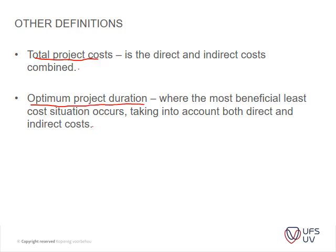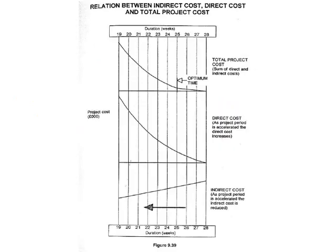We're going to look at total cost and project duration by means of an example. Basically, you've got your indirect costs and your direct costs, and if you add those together you get your total cost. Your indirect costs have a constant slope — like your daily or monthly preliminaries — while your direct costs escalate as you reduce the time needed.